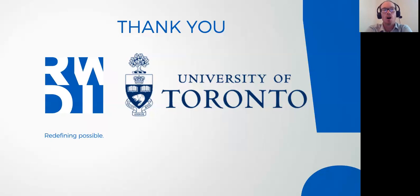Good point. And on that, the vast majority of commissioning contracts are lump sum fixed fee. There are some pros and cons to that, but clearly it's good for the owner. As a commissioning provider, you have to sharpen your pencil and make sure, to Gordon's point, that you're accurate on your fee. Lump sum fixed fee is really not an issue during the design phase. It's more during the testing and issues resolution phase where things get a bit sideways for us, because that's of course the heart of the time. The vast majority of our time is spent during that testing process, and that's typically where things go a bit off plan, if you will.